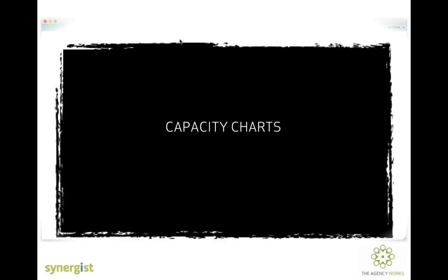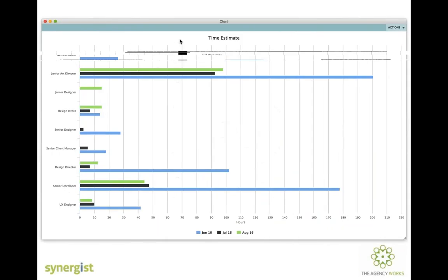And the second thing is the capacity plans. By putting those true, accurate estimated hours into a Gantt chart or anything to organise, we've got these hours estimated, when are we going to complete them, it should give you really true, realistic capacity plans for each of your resources.